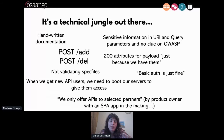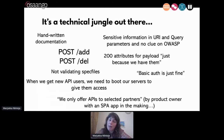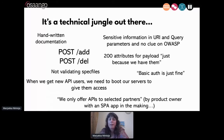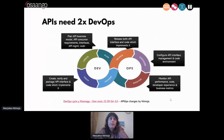When you're building a platform or developing an app, you as a developer might know what you're going to do with those APIs from a technical point of view — but it might not be clear what should be done from a business point of view. Just now in a project, we said we only offer APIs to a selected group of partners. But it turned out to be a single-page app, which means those APIs are out there, exposed, running on customers' devices, and the traffic will be seen by users. That was a problem by design that wasn't known by the business people.